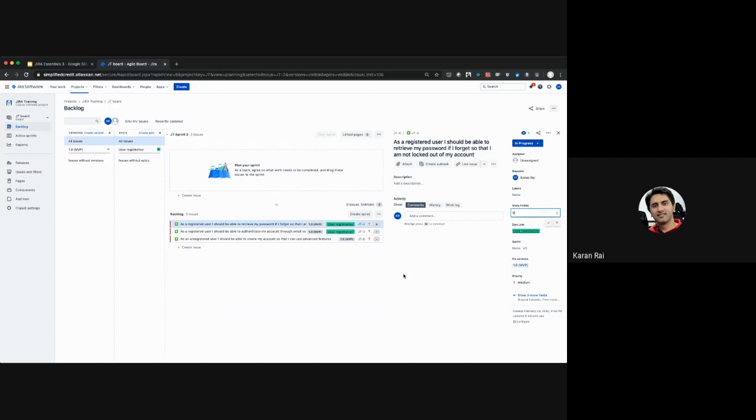So you see my basic point being that this is the objective of planning poker. You estimate, you share your assumptions, you share your thoughts around what's complex, what's not complex. You help adjust everybody else's thinking or understanding of the complexity, and ultimately align on a commonly shared understanding of what a 5-point story really looks like. How complex does it look? Does that make sense?